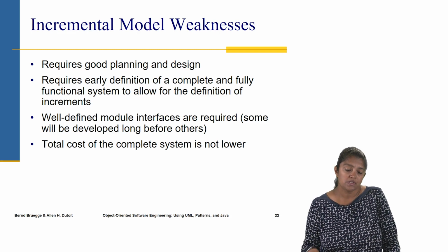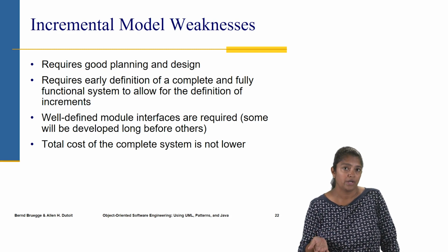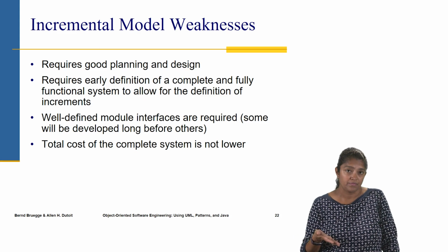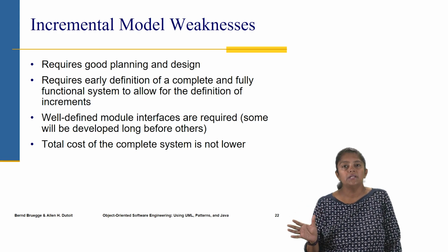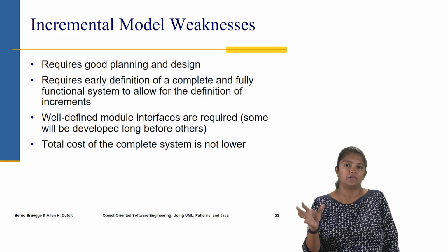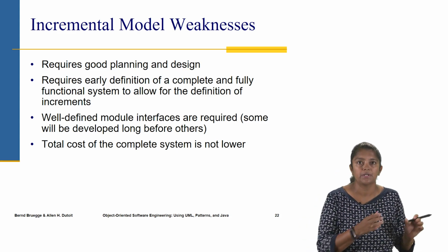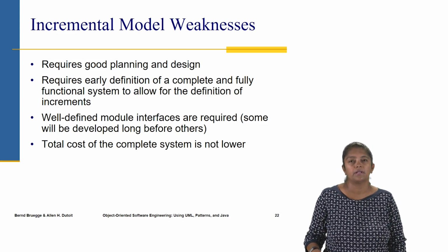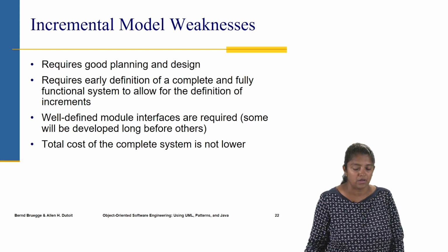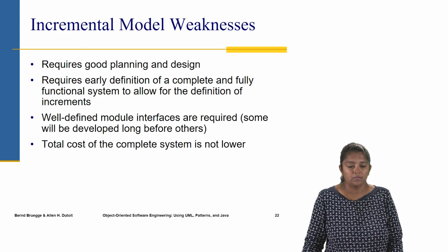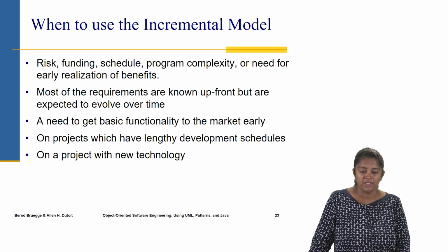Now the total cost of the complete system itself is not lower, it's probably still the same or maybe even more. But the initial delivery cost is lower because we are able to get some working product at the beginning much faster with less money. So those are some of the weaknesses.